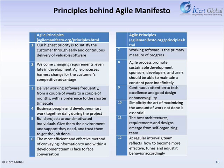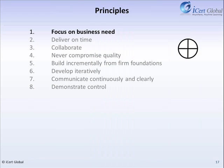Principles Behind the Agile Manifesto. These 12 principles, when followed properly and applied in business, will lead to better outcomes and better software. The first principle focuses on business need: the highest priority is to satisfy the customer through early and continuous delivery of valuable software.